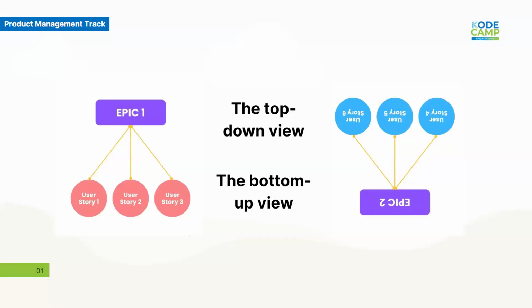velocity tracking and estimation, because at this point you can measure the smaller chunk of work much more accurately, right, than the giant epic. Because if you say user authentication, there are a lot of things under authentication. So before you get to check off authentication, you're going to have a bunch of review meetings, a bunch of follow-ups to do.